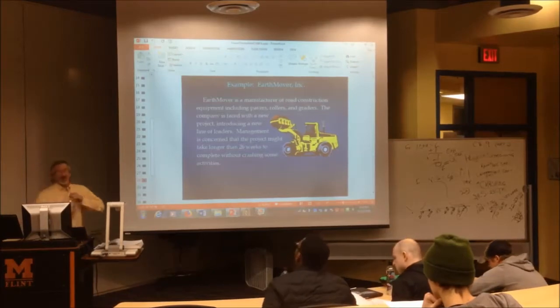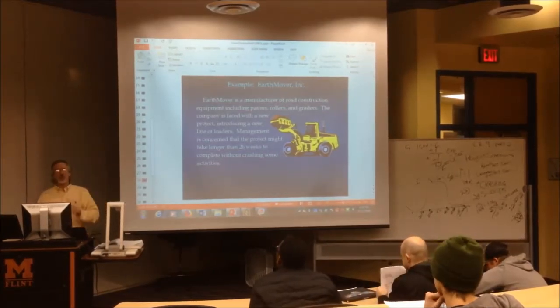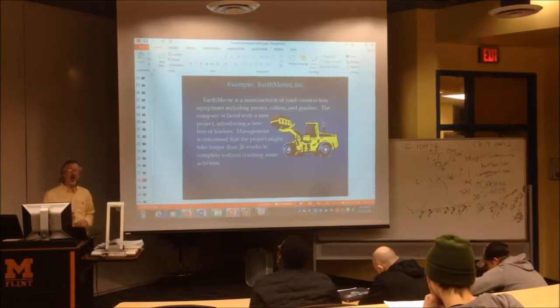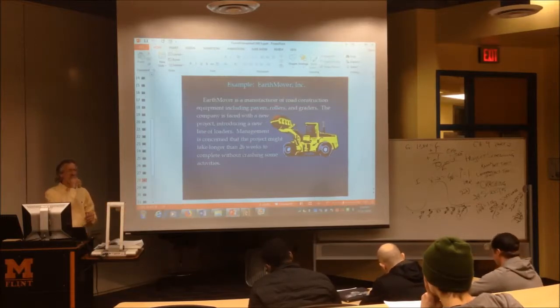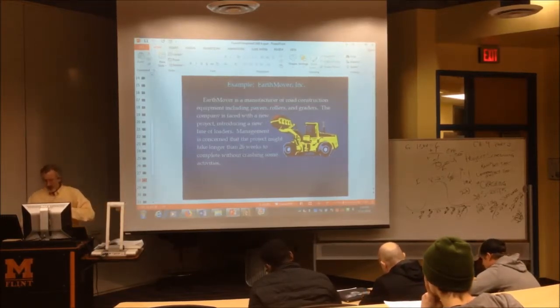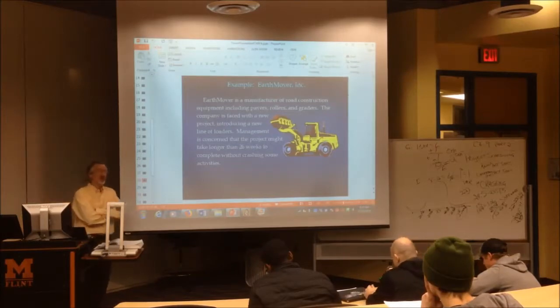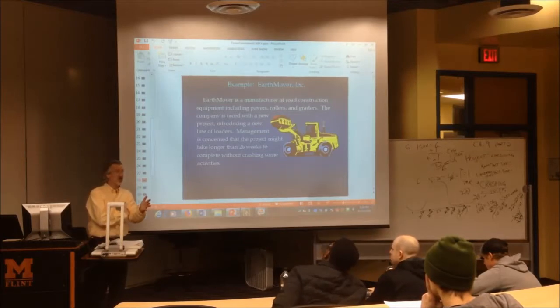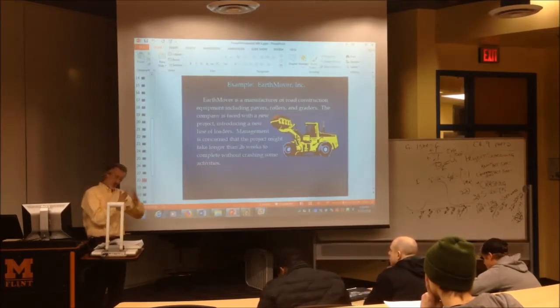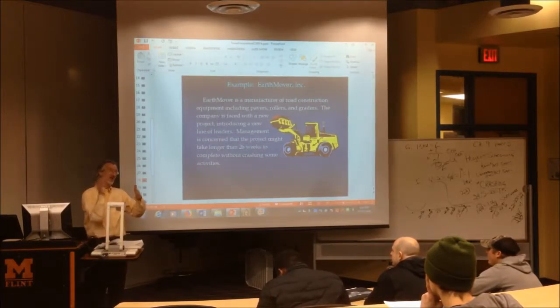This is real. You got assigned to a project, you have a bunch of people involved, you've done a ridiculous amount of meetings to come up with all the activities involved in doing the project and their activity times. I told you most of my experience has been constructing projects. Once the project starts, you're not done with meetings. You go through a phase, you're meeting again, double checking: how did it go, are we on track? What are the activities, does everybody agree these are still the times that are expected? And you go through that phase and meeting again.